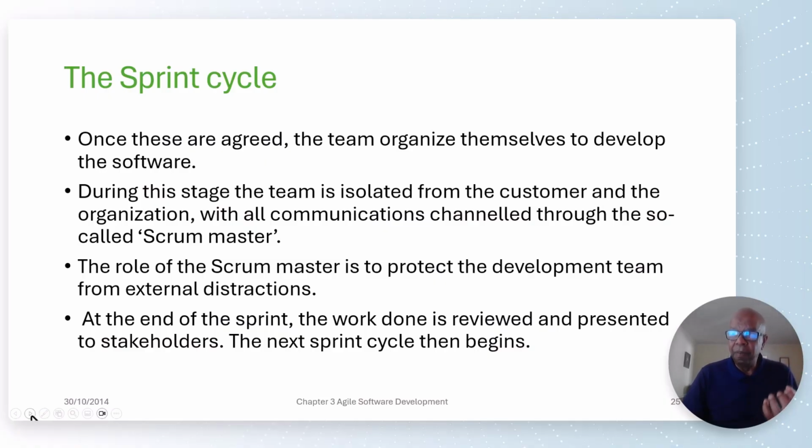Okay, when a user comes in and has a problem, they're not going to be getting with somebody that's on the Scrum team. Okay, they're going to get with the Scrum Master. The Scrum Master is basically there to provide interference for anything that could prohibit the team from delivering what they said they're going to deliver. And if you think about that, if every day, half of your time is spent talking to the user based on maybe some new idea they wanted, you're not going to be able to produce because it's going to affect your velocity. The Scrum Master's job is to make sure that things do not affect your velocity. Okay? That is the purpose of the Scrum Master.